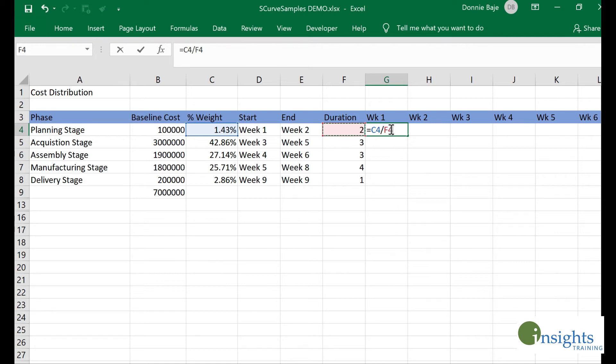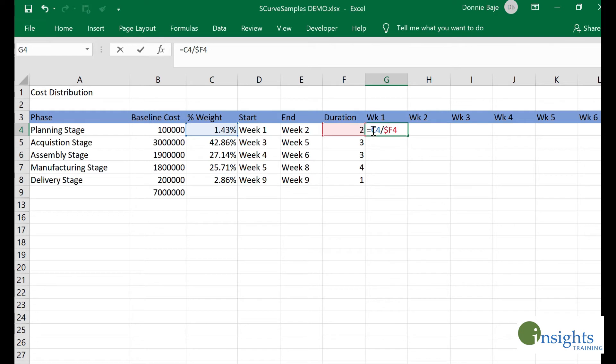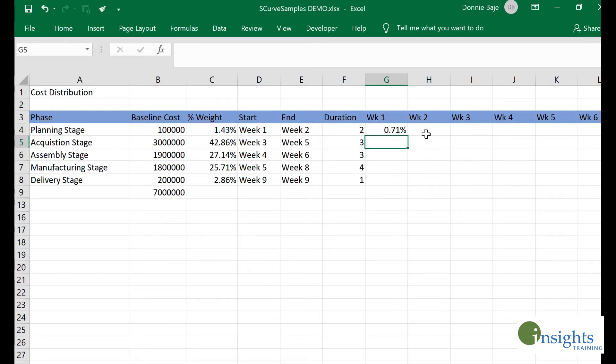I'll get the weight for this stage and divide it by the duration. Then I will lock the columns so that if I plot it, it will not move. I'll be manually locking column C and column F. That means by week one, 0.71 percent of the budget should have been utilized.